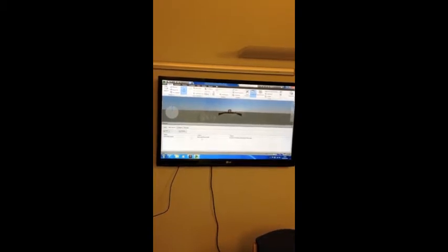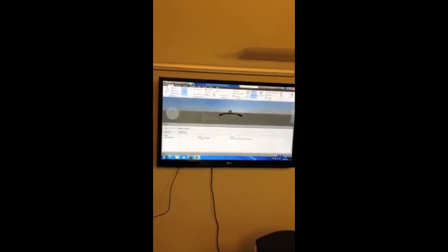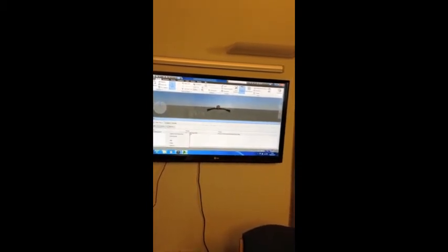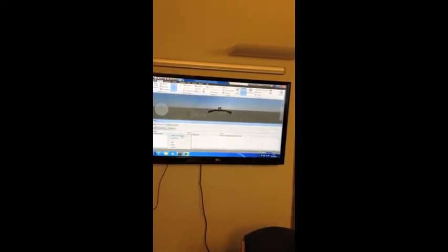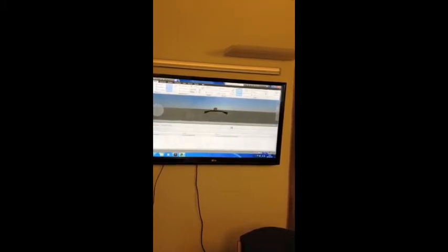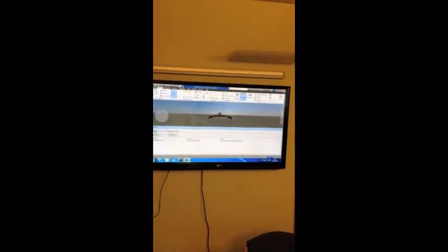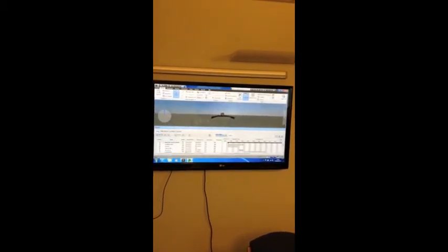Then when you get to this point, you need to right click onto the Microsoft Project MPX and click Rebuild Task Hierarchy. Just click OK. And that should have brought all the data from your ASTA programme into the model. And if you click on the Tasks tab at the top, you can then see your programme in the Navisworks page.